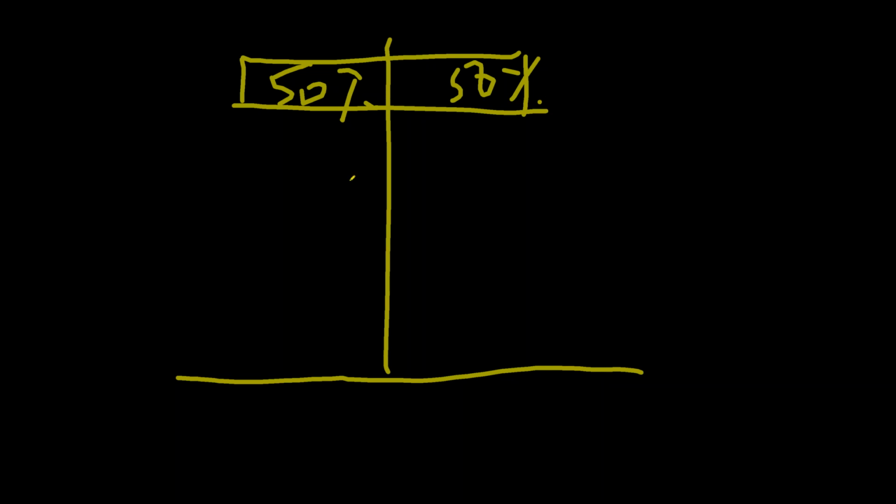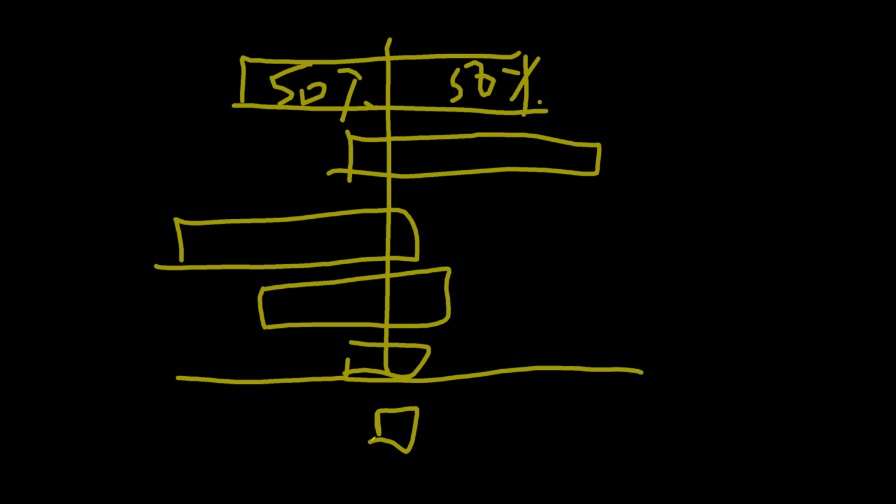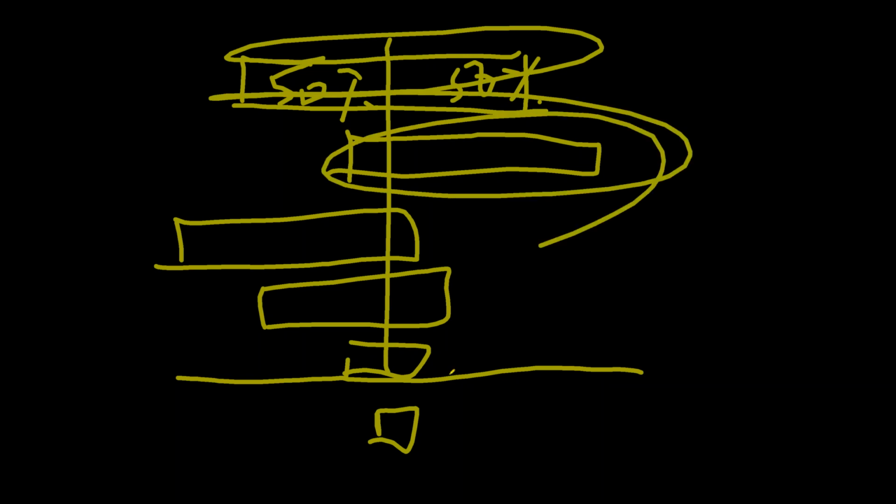So some risks will be like this, less positive and more negative. Some are like this, more positive and less negative. And there could be any shape. And there could be smaller risks, even smaller risks. So if you can plot all the shortlisted risks on a bar in such a way that the biggest risk, no matter whether it is positive or negative, is on top, and then the smaller, and then the smaller, and then the smaller, it will form a shape like a tornado. You see, it is a tornado diagram. Get it? Yes, sir.